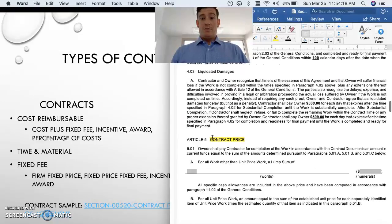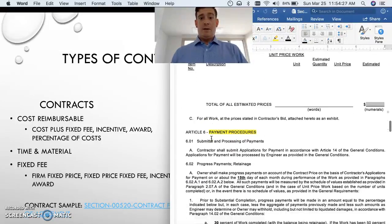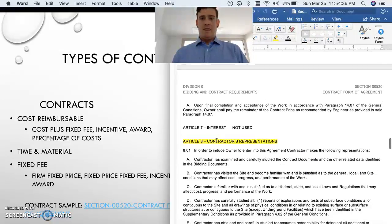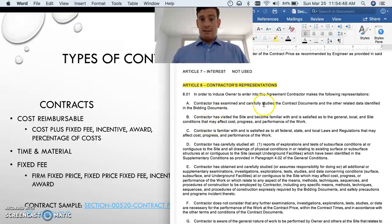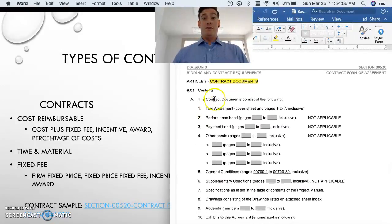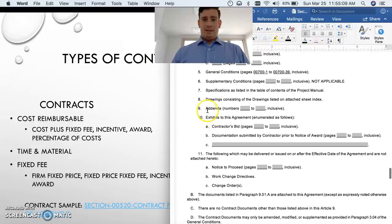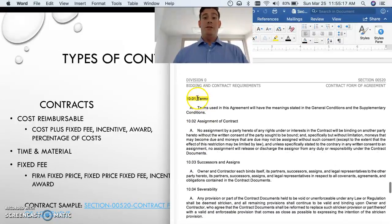We have a contract price - how much is this going to cost, what are we agreeing to. Unit price work, payment procedures - how and when is the buyer going to pay the vendor. Contractor representations - in order to induce the owner to enter into the agreement, the contractor makes certain representations, such as having examined and carefully studied the contract documents. The contract documents include this agreement, performance bond, payment bond, general conditions, all exhibits, and any addenda.